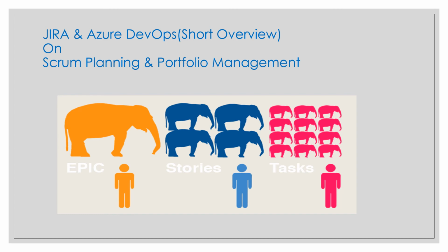In velocity, you write the story points of sprint 1, plus sprint 2, plus sprint 3, take the sum, and then divide by the number of sprints. In our example, you divide by 3. That will be your velocity. The burn down chart and the velocity chart are among the progress charts that many organizations prefer in agile projects.